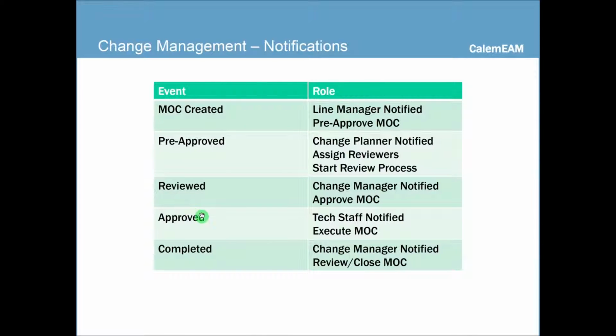If an MOC is approved, then the technical staff get notified. They can move the status to in progress to start the execution. And once it's completed, change manager gets notified and can review and close an MOC.